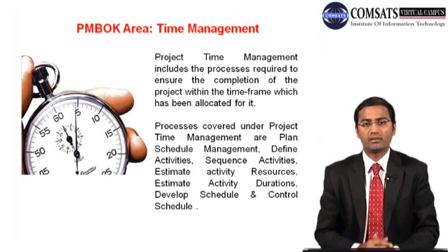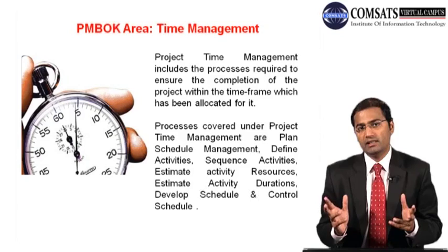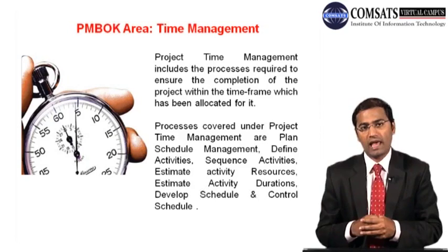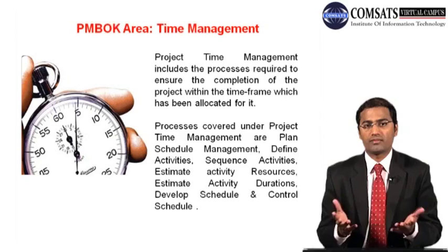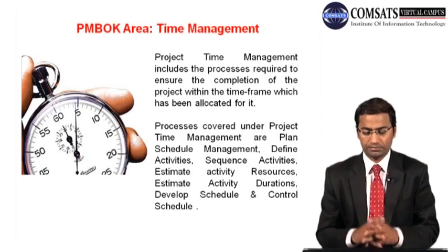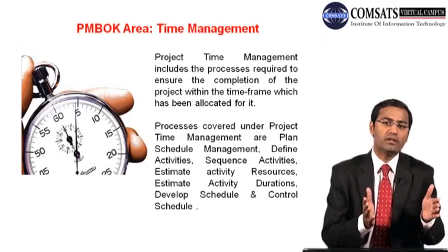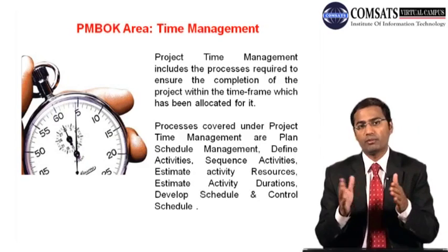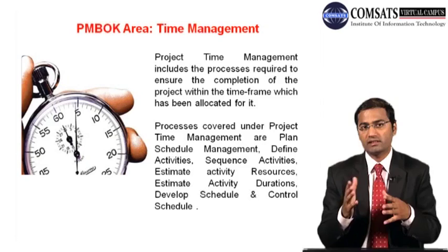So if this activity is constructing a 10 meter length wall, and the height of the wall is 4 meters, and the thickness of the wall is 9 inches, what will be the resources then? We will calculate the number of bricks, the number of cement bags, the number of cubic meters of sand, the number of liters of water, the number of masons, and for which duration.